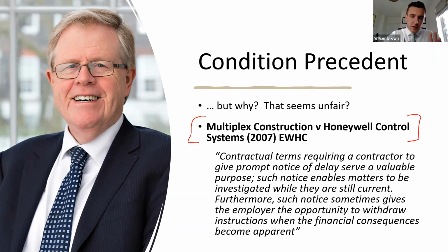It sets out that contractual terms requiring a contractor to give prompt notice of delay serve a valuable purpose. That notice enables matters to be investigated whilst they are still current. The point of these notices is to give the employer the opportunity to do something about it at the time. That is why contractors are required to notify it early, so that something can be done about it.